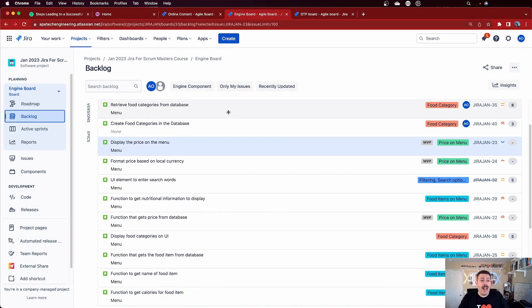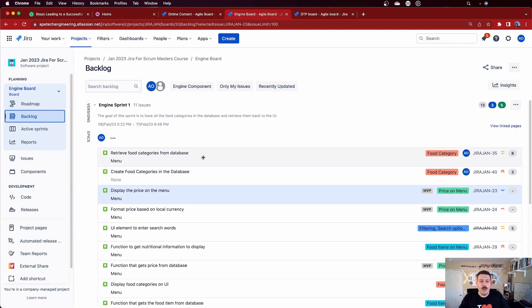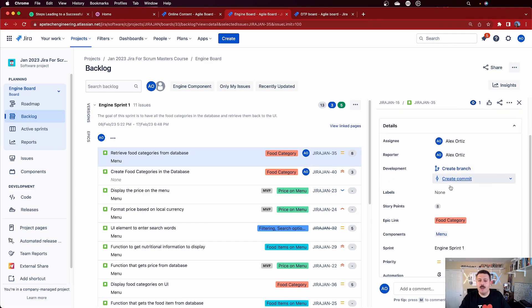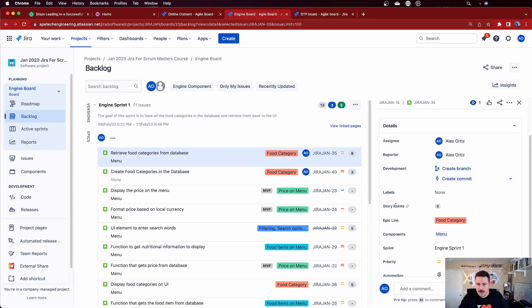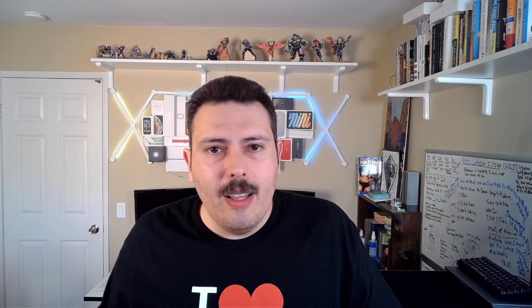So how do we get a number into that little bubble? For every story that you're planning into your sprint, you click on it and then on the right-hand side you look for the field 'story points.' Once you've identified that field, you click into the value box and change the value. This is really how you use Jira — nothing new. For everybody it should be a review, unless you've never used story points; this is how you add them. In a company managed project, you have to go through each one individually and find the field.